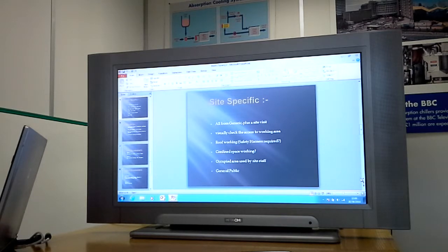Is noise going to be a problem? If a tower or powered access equipment is required, what route are you going to use? Will it impact on anybody else? Any H&S issues? What specific site restrictions, if any, apply? Do you need any permits to work? If so, what type and from whom?